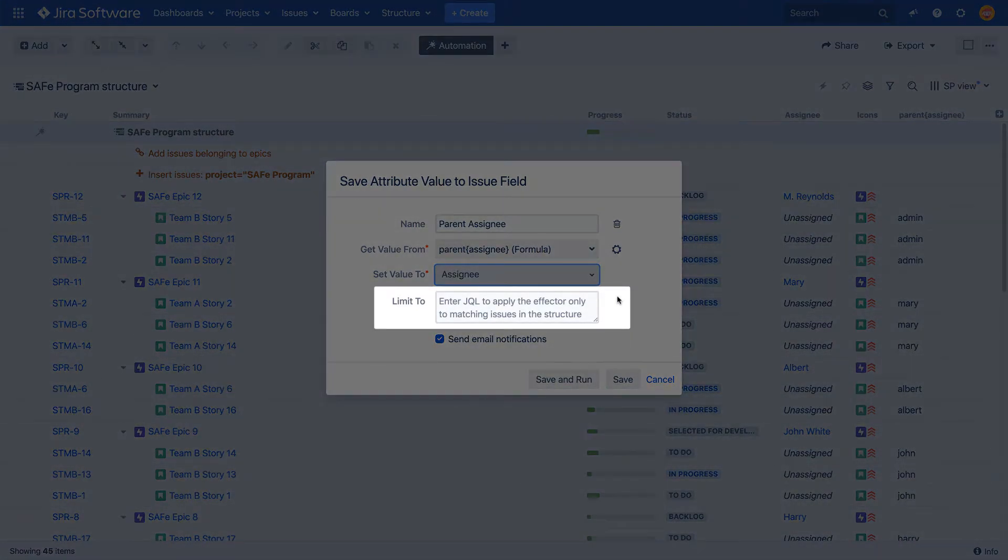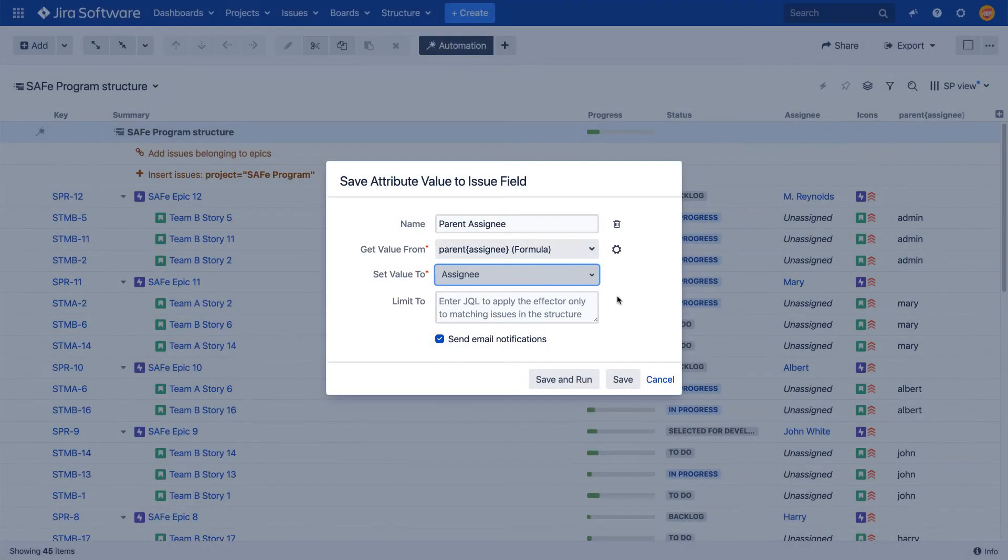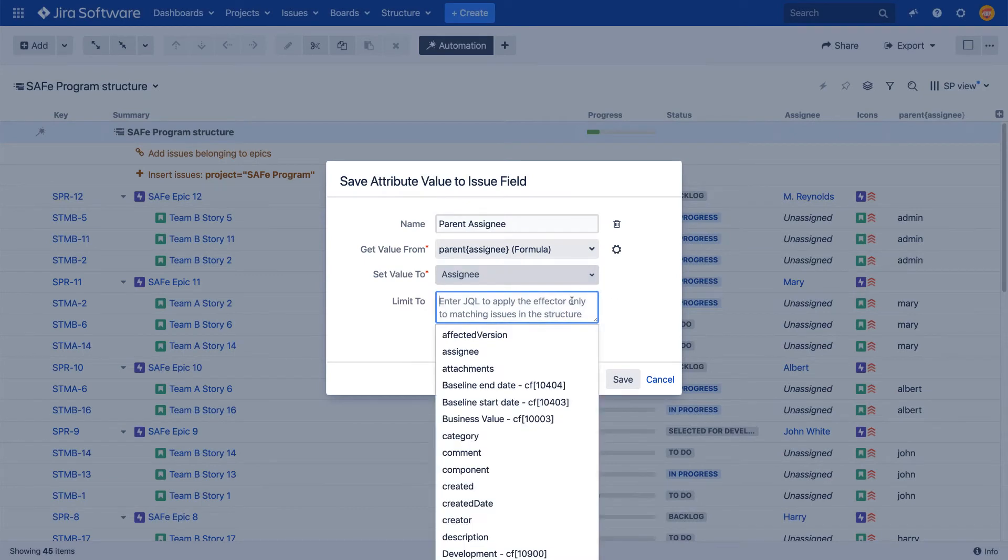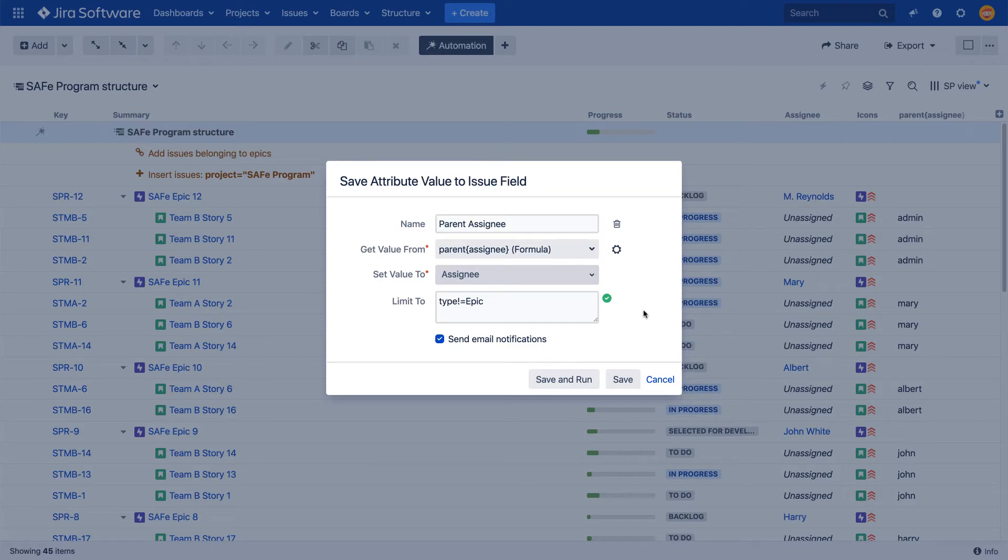A JQL query-based filter. This is an optional field that allows you to limit the scope of the effector to just update issues that match the query. In our example, we want to limit the changes to stories only. Since there are no values for epics in the formula column, if we leave this field blank, all our epics would end up unassigned when we run the effector.